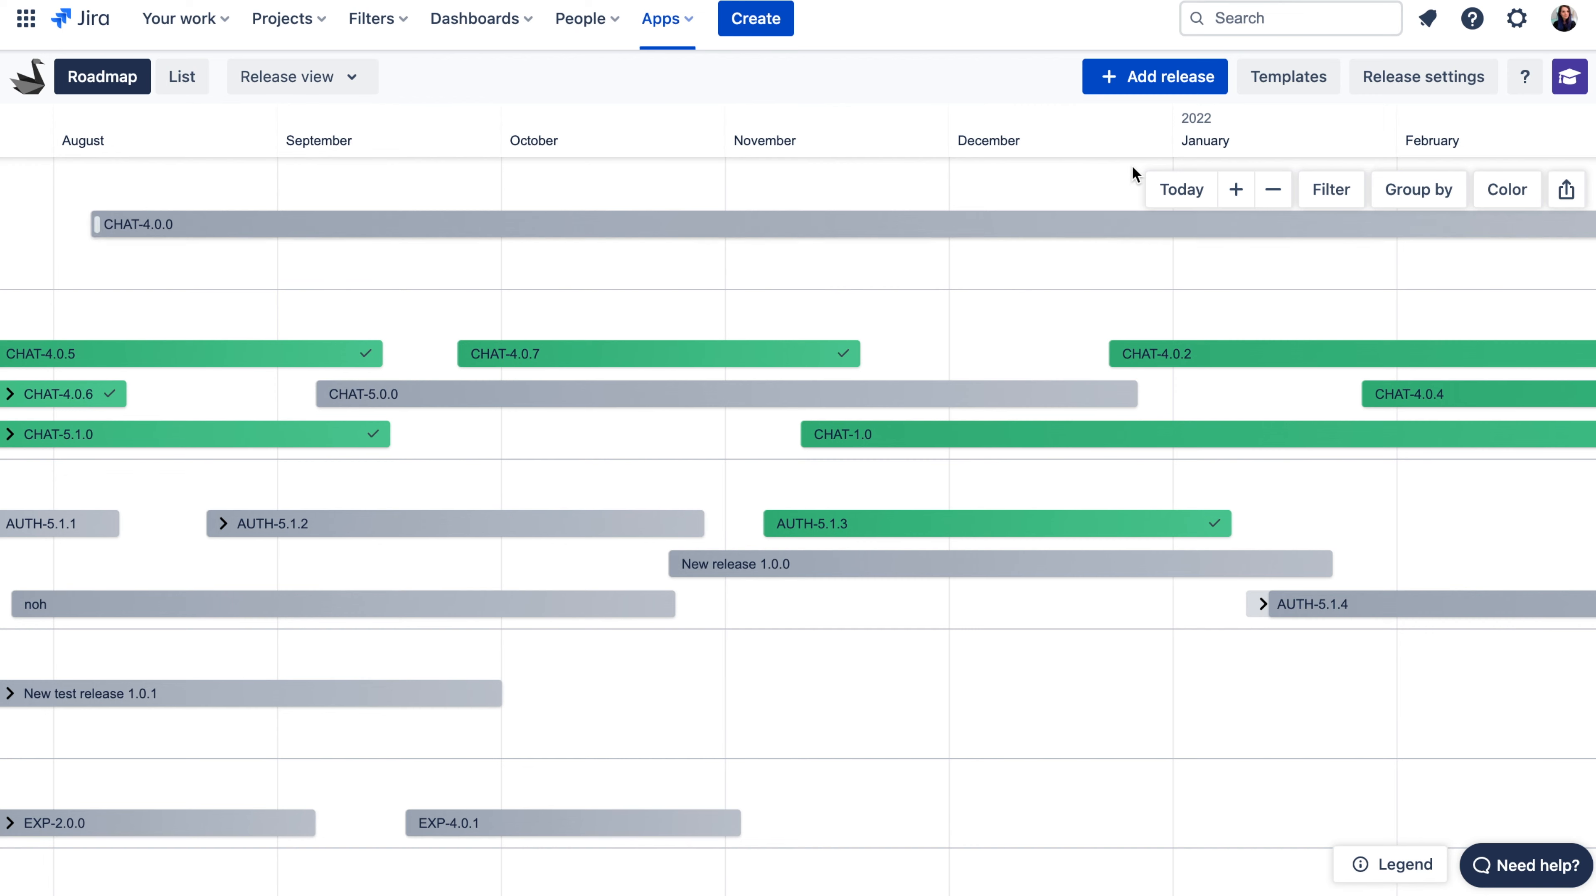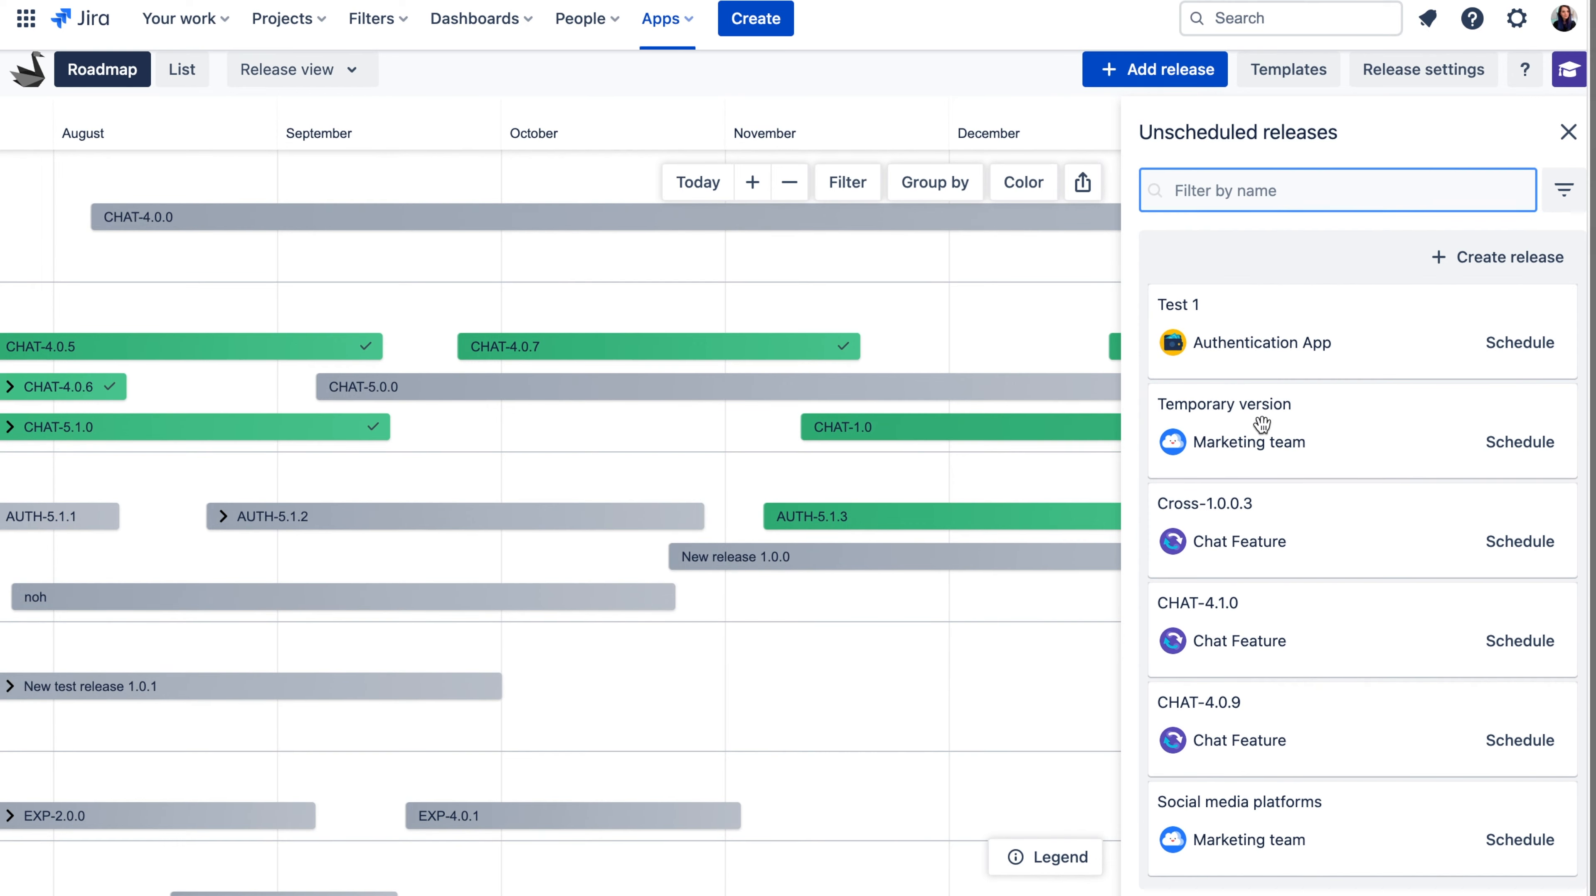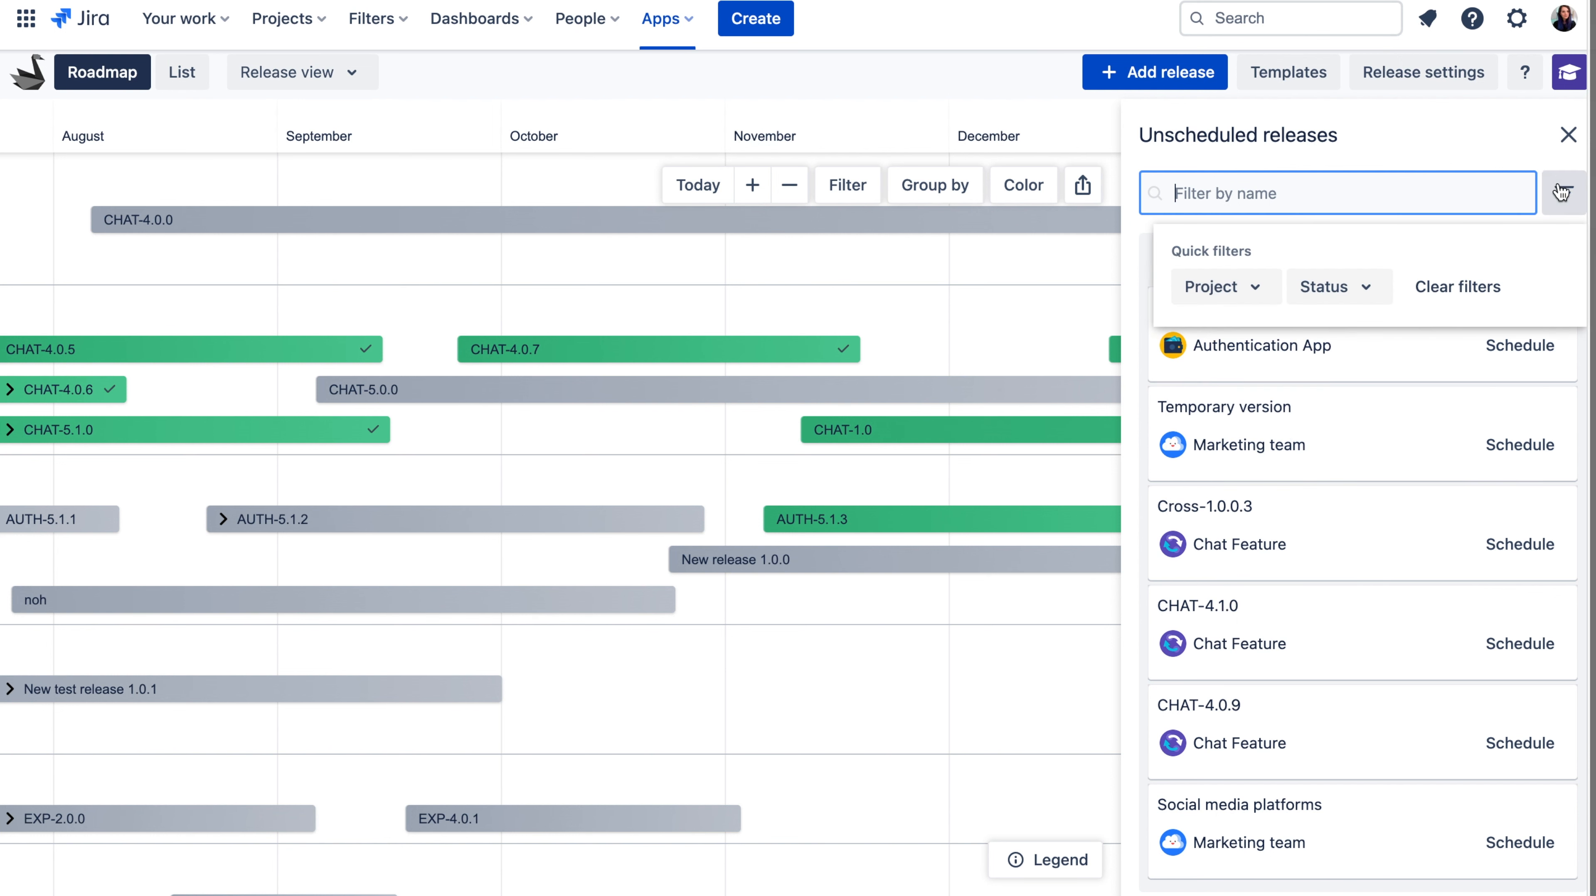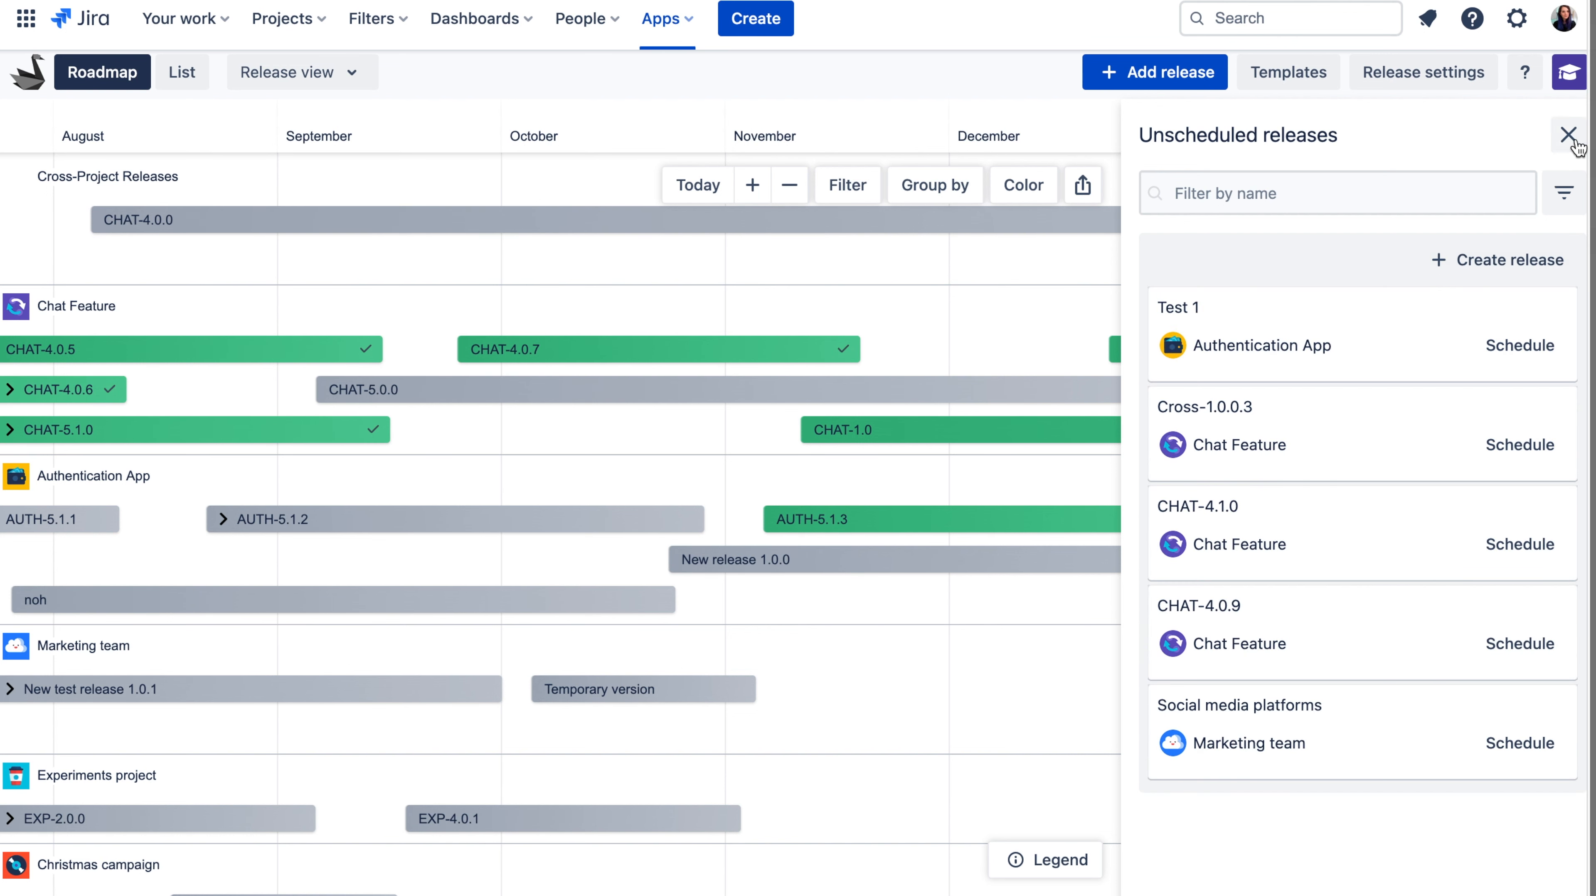If you want to schedule an existing release or quickly create a new one, you can use an add release button. Here you can see the list of all releases that don't have a start date or end date assigned. You can use filters to quickly find the release you need and then drag and drop to schedule release on the timeline calendar.